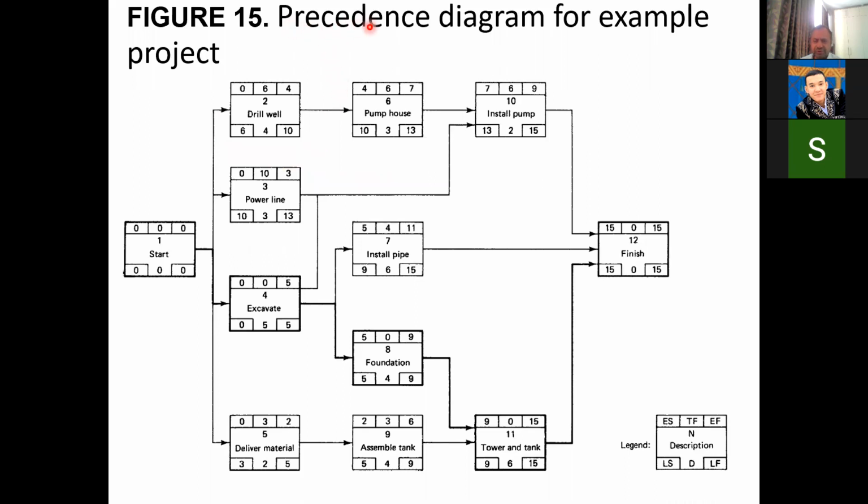And it is also a precedence diagram. Normally we specifically use a precedence diagram for those diagrams in which we use lag relationships, such as a lag between the finish to start, or a start to start relationship, or a finish to finish relationship. Although in this case, because we are just representing the previous example, in which there were only finish to start relationships, there are no finish to finish or start to start relationships. There are no lag relationships over there.